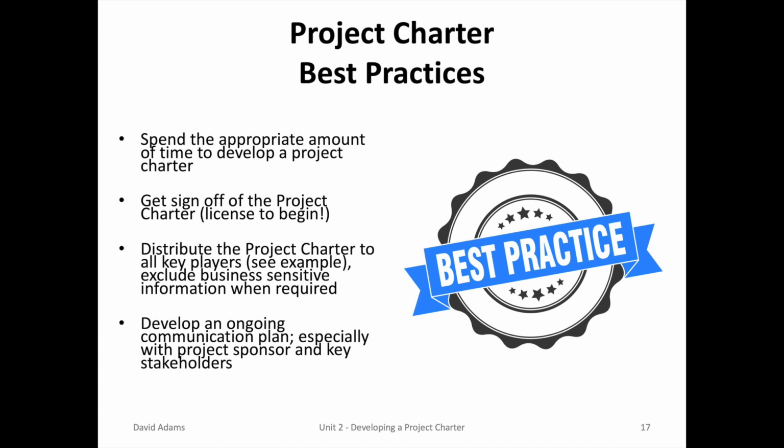You need to distribute the project charter to all key players, but also take note, you may have to exclude business-sensitive information when required. And start to develop an ongoing communication plan, especially with the project sponsor and key stakeholders.